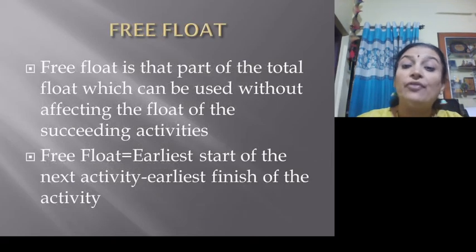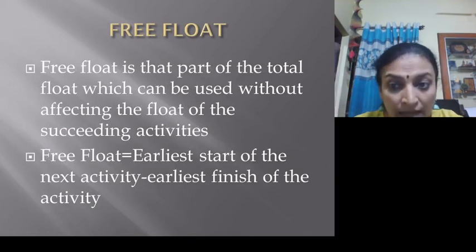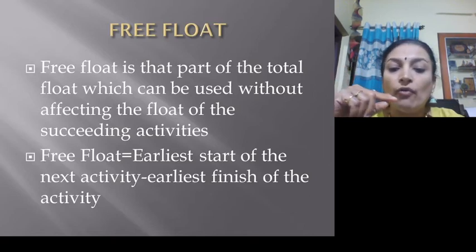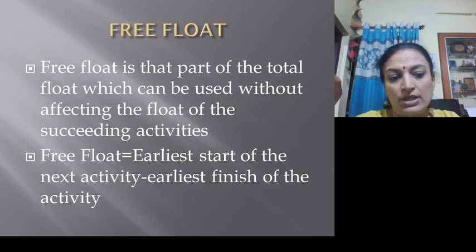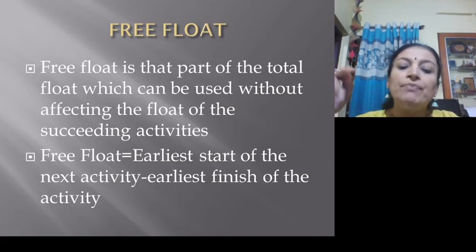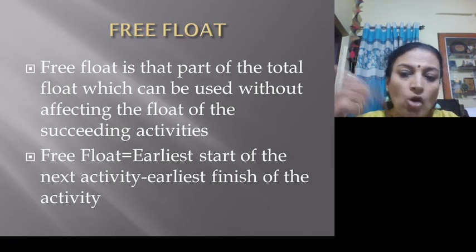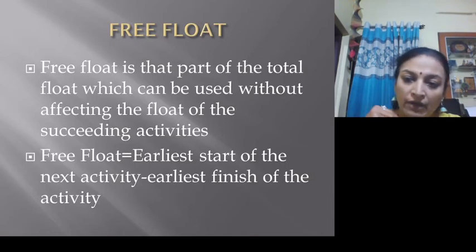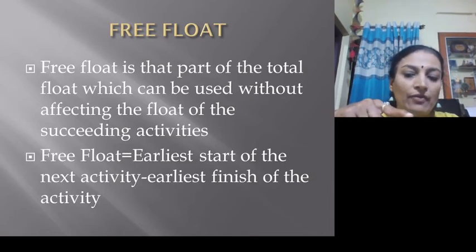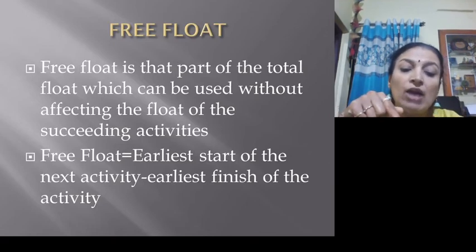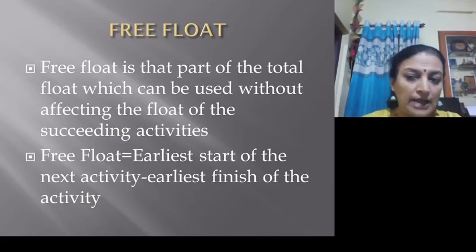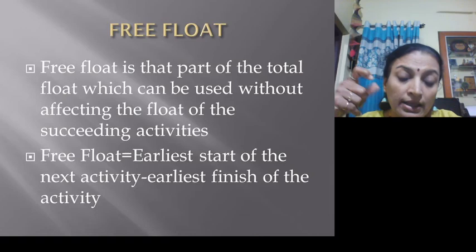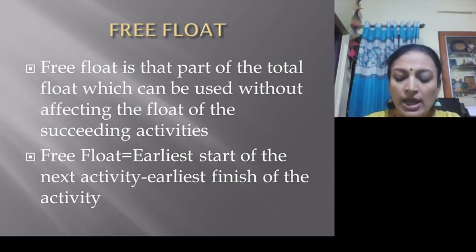In the same way, what is free float? Free float is that part of the total float which can be used without affecting the float of the succeeding activities. That means free float is equal to the earliest start of the next activity, not this one, the next activity, minus the earliest finish of the activity. For which activity we are calculating the free float, for that particular activity we have to see the earliest finish time. And for the next activity, what is the earliest start? The difference between these two is called free float.